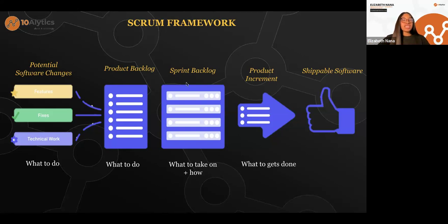And then we now take a look at the sprint backlog. Now, the sprint backlog is gotten from the product backlog. Sprint backlog literally just means the one that we are going to commit to for the sprint. All right. So again, using the house analogy, I'll explain. Let's say you have a list of 70 things that you want to buy for your new house. Now you agree with me, because of the economy, you can't buy all 70 at once. So you might have to pick the most important ones. Maybe you are like, you know what, I'm going to get paid on the 30th of June. So once I get my next paycheck, I'm going to pick 5 things from my list that I'm going to buy. I'll buy 5 things this month end, and next month end, I'll buy another 5.